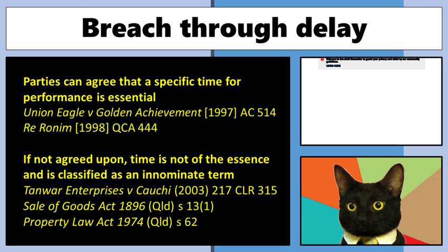All right, so just make note of that second part there. If you are doing any form of contracting, reading and putting things in contracts, make sure you know that fact. Make sure you know in a contract whether time is of the essence. It will be in contracts, and this is probably the first actual interpretive thing that you can go through armed with this piece of technical information to determine, because that will impact the obligations of the parties and dollars if they don't do things within the time stipulated. All right, time is of the essence.